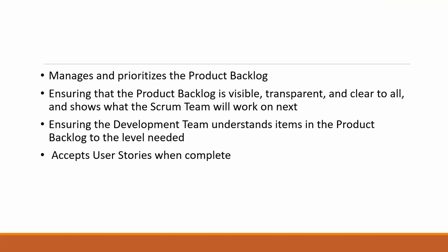The first question is what business value it will add for the stakeholders to access your board, because they might have other priorities they're concerned about. In my organization, we connected Jira to Tableau, and we monitor how many features are being completed. They have access to certain metrics regarding the number of features completed, but they're not really concerned about the stories specifically. We have a feature board, a roadmap for those products, that they have access to.